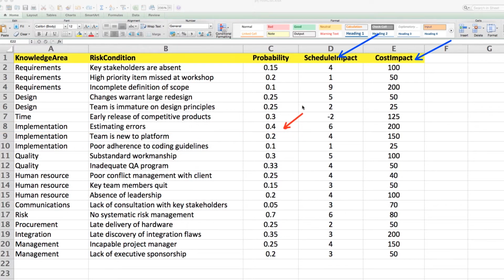So I will turn the switch on this particular risk which happens during implementation, and it becomes an issue. Going further down, I have this being less than 0.7. I will turn this risk on, and no other risk becomes an issue in this so-called round. Meaning it's going to cost us? On the project's schedule as well as on the costing.